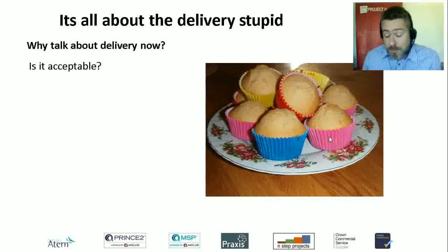That might well happen anyway, but then at least you can say, hold on, this isn't what we agreed at the beginning. It's going to change, it's going to cost more money, it's going to take longer. If they're always changing and you haven't really fixed the starting point, then you're in trouble. It's not going to work very well. So it's a good little illustration about cakes.